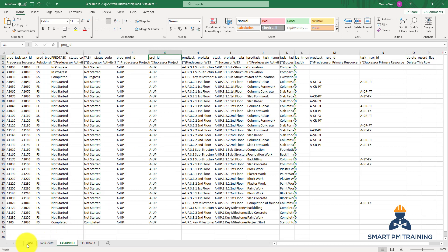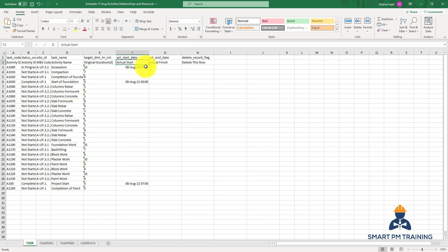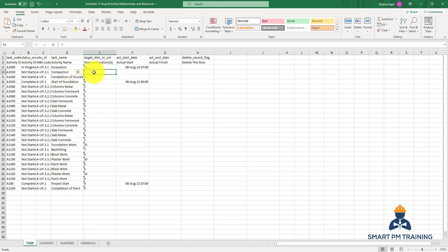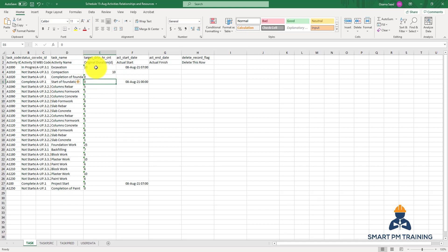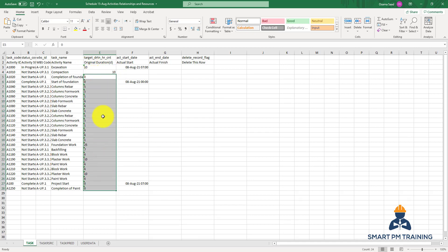For example, in the Task sheet, if you want to change a start date in Excel and import it back to Primavera, you have to keep the same code in row one so Primavera can recognize it as the actual start date. For duration, this activity 'Compaction' has 7 days — I will make it 10 days. If you make any changes, the value needs to be in text format, indicated by the green dot alignment — that is the format Primavera requires.